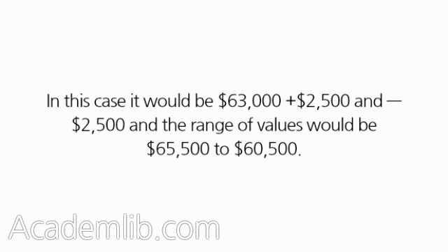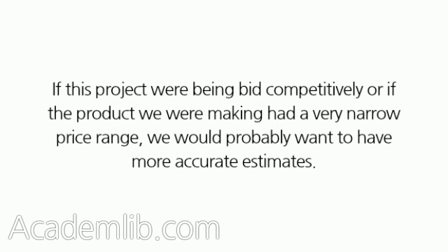In this case it would be $63,000 plus $2,500 and minus $2,500, and the range of values would be $65,500 to $60,500.